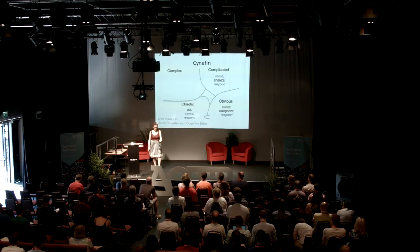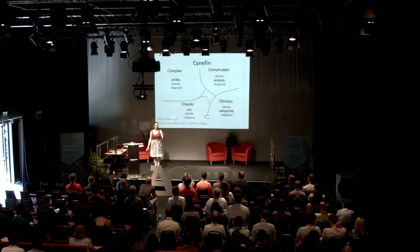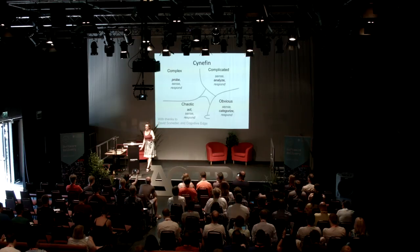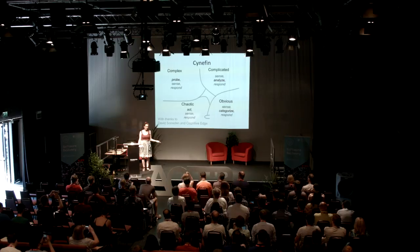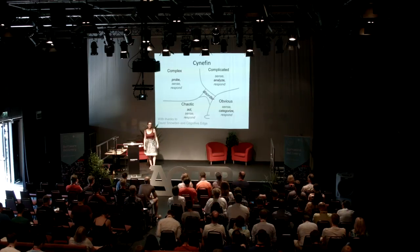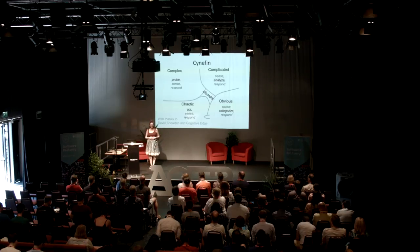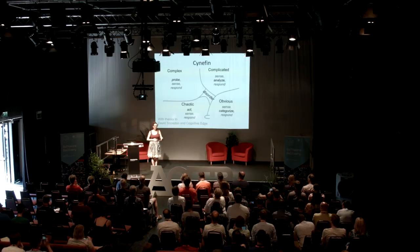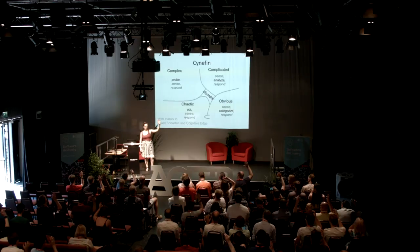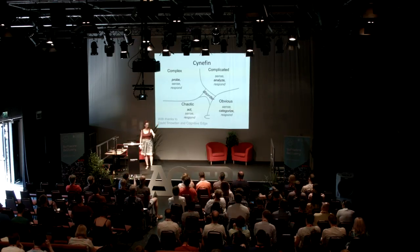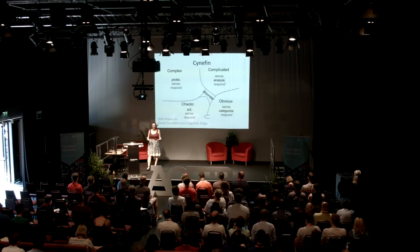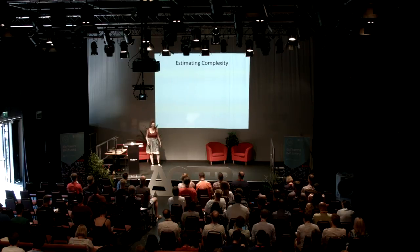Conversations are really lightweight and pretty safe to fail. In the middle we have disorder — the fifth domain — where we do not know which of these domains dominates, so we behave according to our preferred domain. Put your hands up if you've ever been asked for an estimate in time or money for something you've never ever done before. Keep your hands up if you're a fool like me and you gave one. Keep your hands up if that got used as a promise or a commitment. That's disorder — taking something with high discovery and unknown unknowns and pretending it's going to be okay.